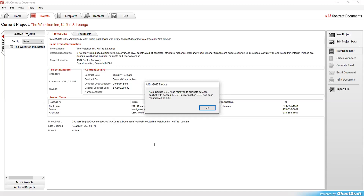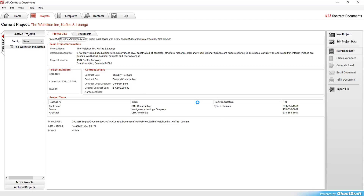Every now and then you get these little notices that come up - these are really legalities-type things. It's telling me that in the 2017 version, Section 3.3.7 was removed to eliminate potential conflict. As I think I mentioned in class, about every 10 years they update these things. In that 10-year period, contracts go through disputes, arbitration, and litigation - the AIA tracks that stuff and goes back to fix the contracts to eliminate any type of ambiguity that might exist. So I'll go ahead and say okay.